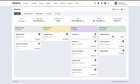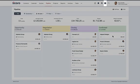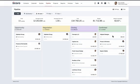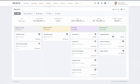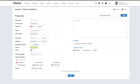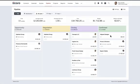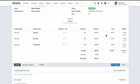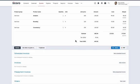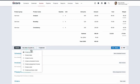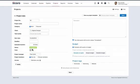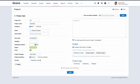You can start a new project from just about anywhere in Scoro. From the Quick Actions menu, by going to the Projects list, or from the Client view. You can also use project templates to easily set up your most common projects. Today, we're going to use the original quote and convert it into a project. Open the quote and scroll down to the Use Data on Quote button, and here you will have the option to create a project based on the quote. As you can see, some fields are already filled in, such as the Client and Estimated Duration. The Duration is the summary of the quote's line items, but you can always change that to add some buffer time. The project budget is automatically added based on quoted prices, so you can keep track of what you've originally planned, versus the actual income or cost that will be linked with this project.